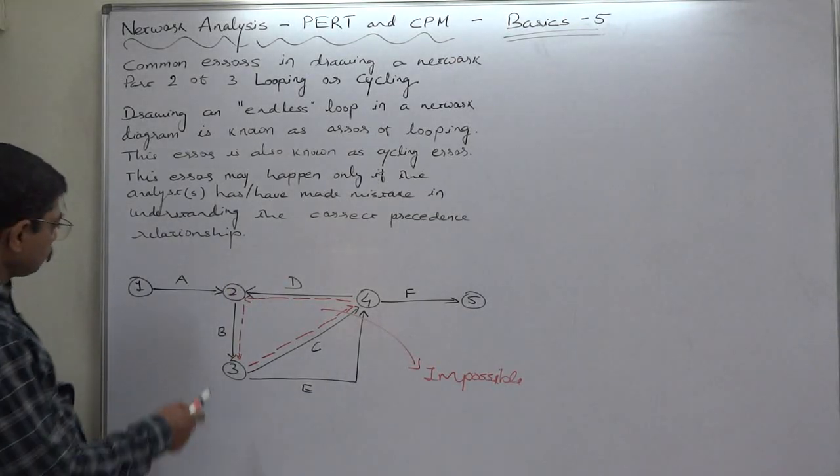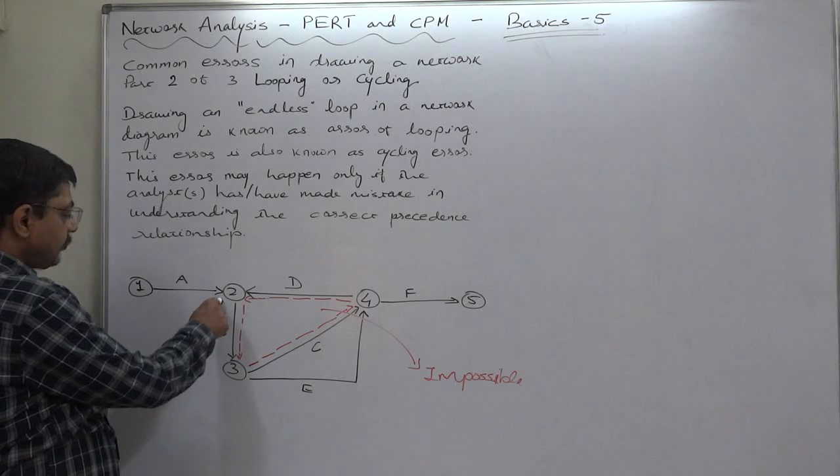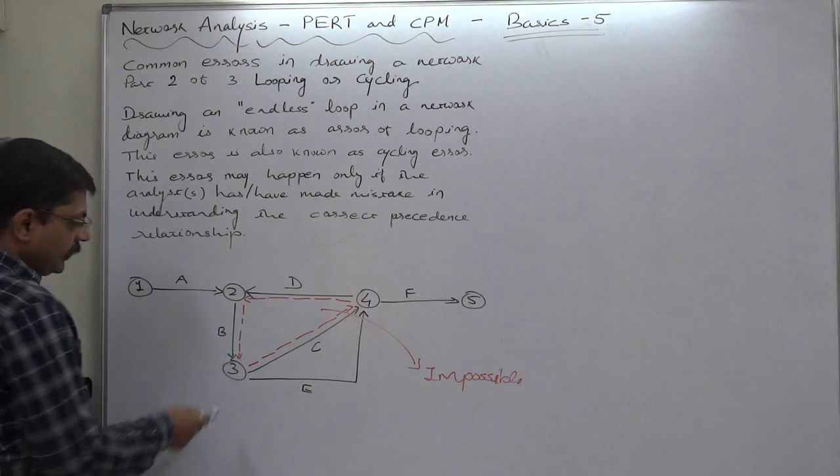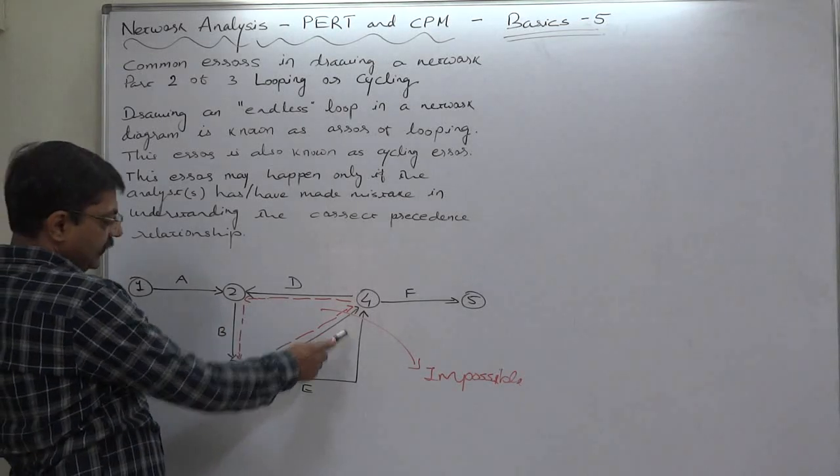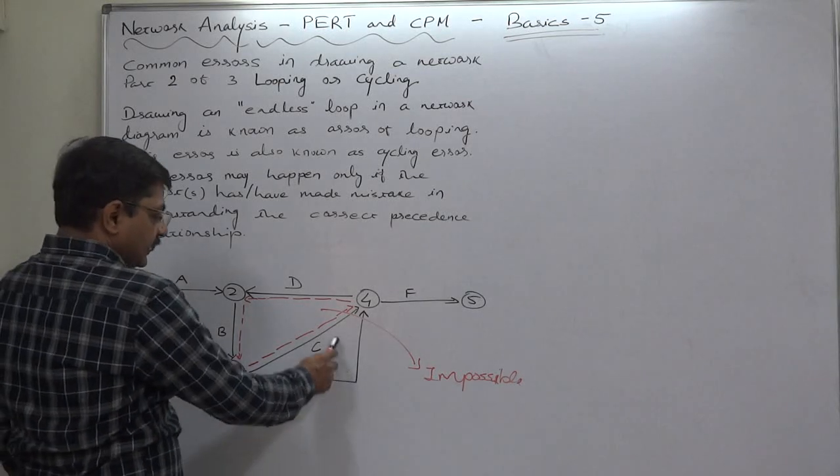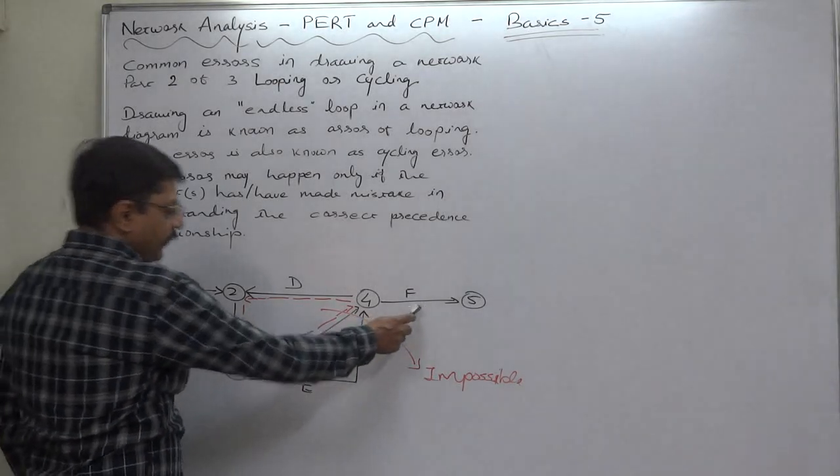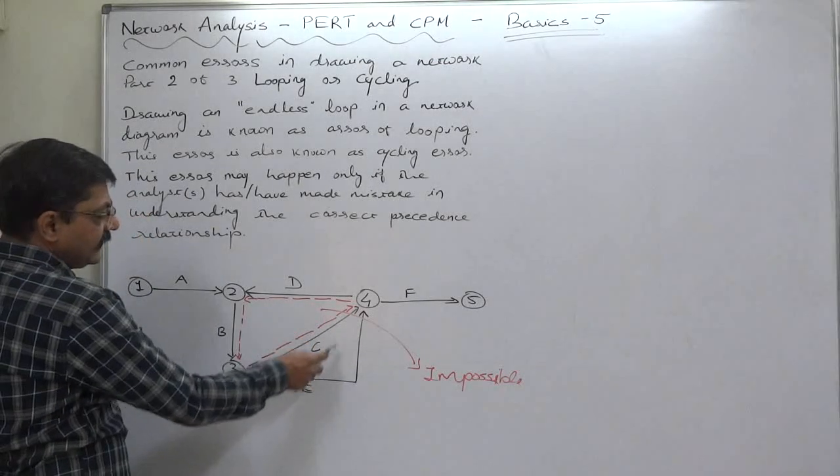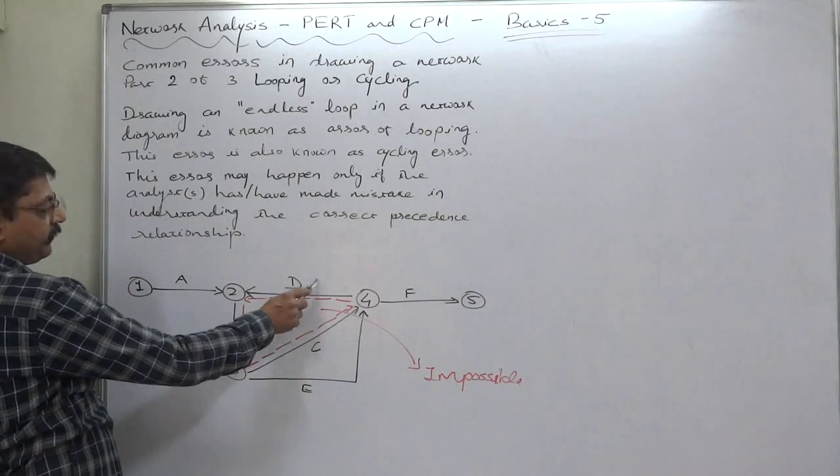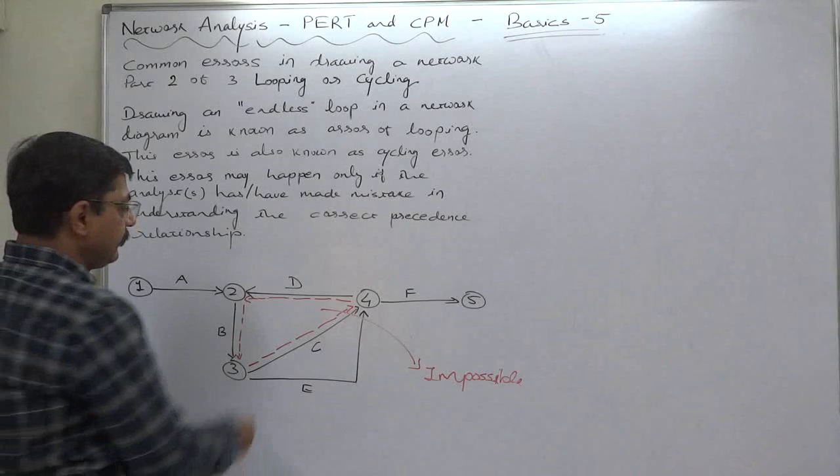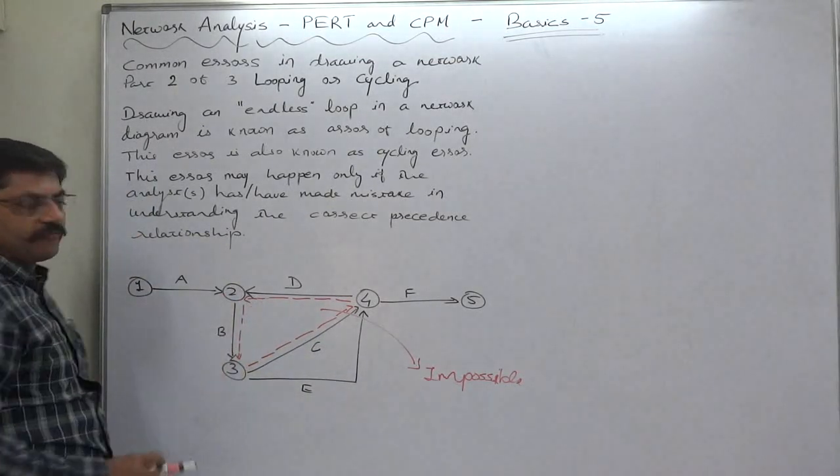In this network diagram, A is predecessor of B. B is predecessor of C as well as E. C and E are predecessor of F. But C and E are also predecessor of D. But the surprising element is D again becomes the predecessor of B.